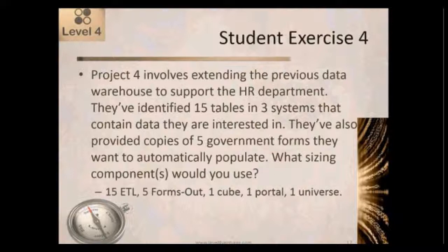Yeah, well, generally speaking, if we were looking at a fairly large effort to install and configure an off-the-shelf product, and at the time we're doing the estimate we don't have a comprehensive list, or we don't really have a strong idea of who's going to use it, how they're going to use it, what they're going to do with it, and so on, I would estimate that as a configurable COTS application install.